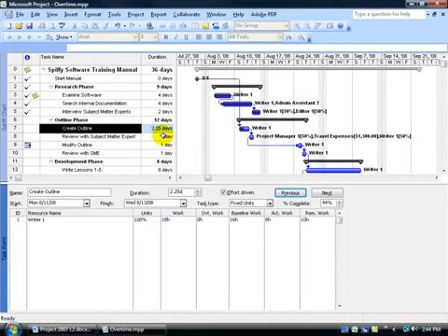Now you can see the duration is 2¼ days. Come down here and give the overtime work of 2 hours, click OK. The duration's cut back because now he's working 2 extra hours on one of those days. Is it the Tuesday or is it the Monday?